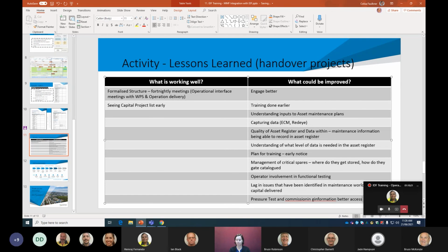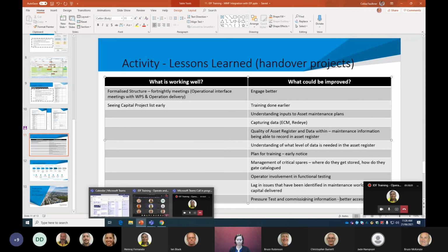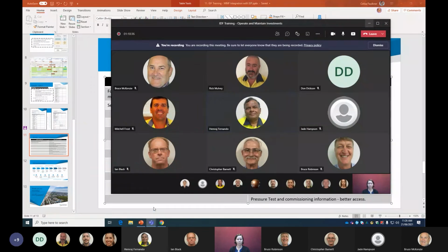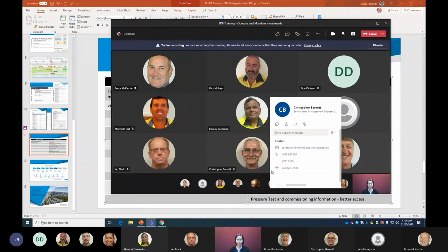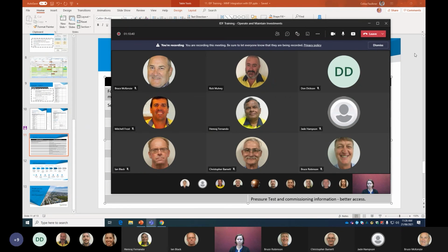I think we've had some discussions with Clint as well recently around how we capture some of these commissioning ITPs in the water space, and then ultimately get that asset operator sign off before we're happy to bring those water mains online.